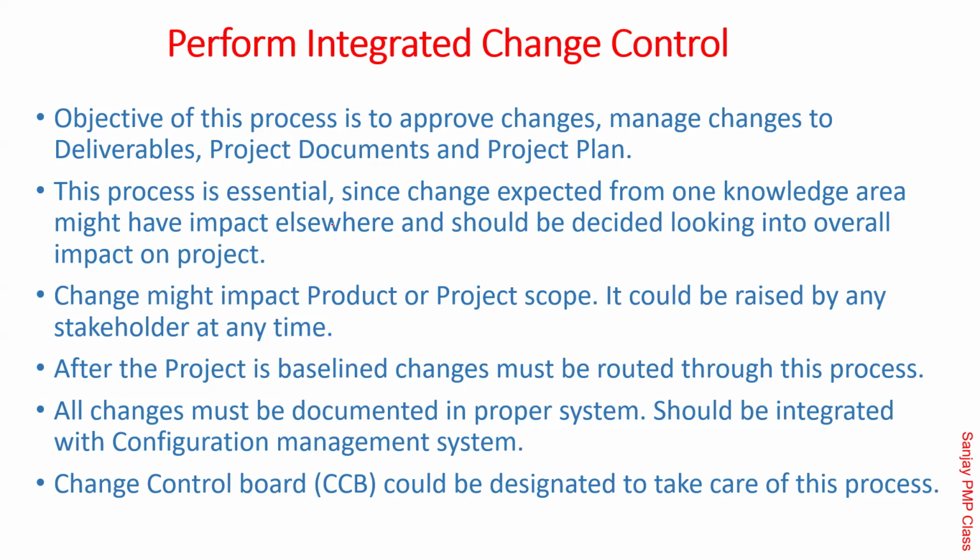The process is essential since a change expected from one area might have impact somewhere else. The people who are raising the change request have only one view in their mind. They are looking at that change from there. The cost manager is telling you that you are bad in terms of cost, and he might come up with a solution saying that all the expensive resources should be released. Now, remember, it's only his view because it's a cost-based view. Removing expensive people from there might mean something else. It might impact the quality, it might even impact the timeline. So someone will have to sit together and take a consolidated view.